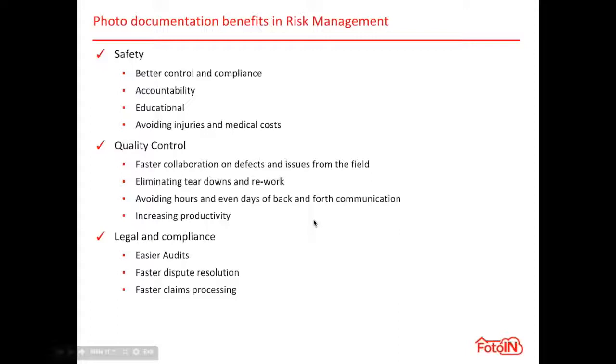So I think it's a good tool not only for the general contractors in the room, but it's also a great tool for trade contractors who want to protect the integrity of their work. But we've had several incidents in recent memory where we've had injuries and workers that come with claims, and photo documentation has helped us to prove that the situation wasn't what the injured person claims it to have been. And so we've been able to protect ourselves from several claims just because of proper photo documentation.